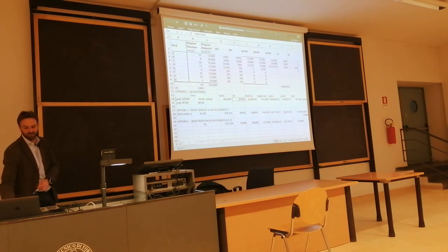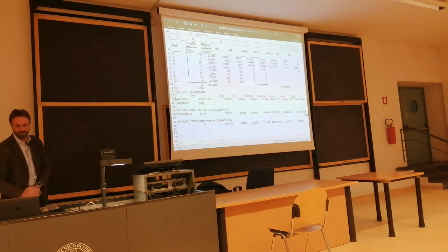Fixed fee is still the same. Target cost is 152,000. So price would be all cost incurred reimbursed plus the fixed fee less 50% of savings or cost overrun, which leads to a profit of 36,000 and a return on cost of 16%.